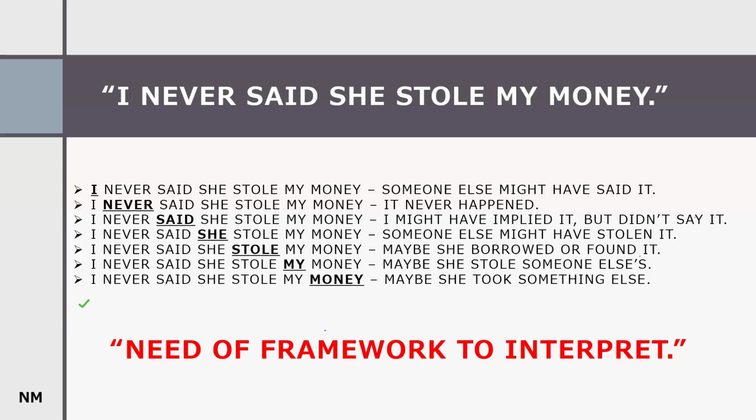I think we can have a similar arrangement regarding the taking of quantities from drawings, which you might be more familiar with. Think about the method of measurement, right? We have a set of drawings. If you give a set of drawings to 10 people, they will take off quantities in 10 different ways. That's why we have a method of measurement with certain rules that 10 people can follow, then we can get a more similar outcome, right?